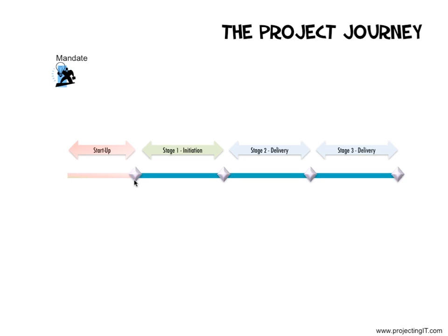The mandate provides the reasons for doing the project. Mandate is provided by the corporate or program management. Mandate defines the terms of reference for doing the project. Mandate is to be investigated further. We need to check the problem and identify a preliminary solution along with cost and timelines. To do this, we have the first process of PRINCE2, which is starting up a project.